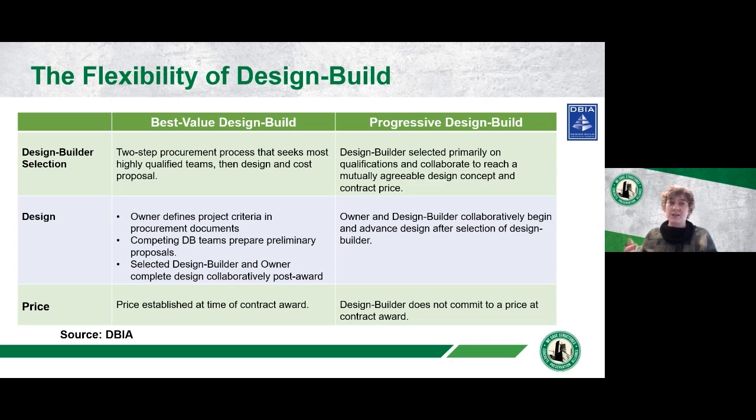The owner then, once they're in contract with the design builder, would have a separate negotiation that takes place down the line once the design has been completed sufficiently, and then you proceed forward with the phase 2 construction once the GMP has been negotiated for phase 1 to phase 2 construction.